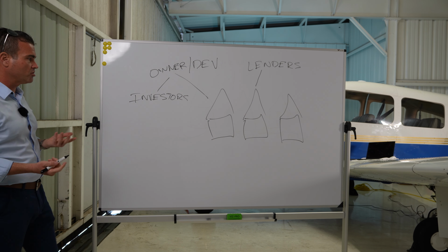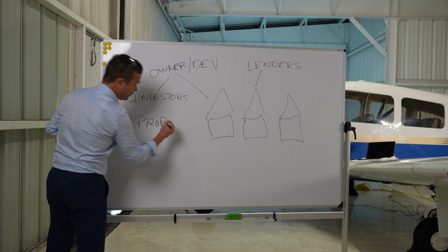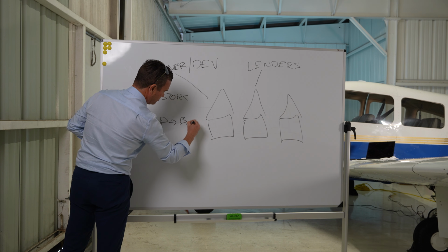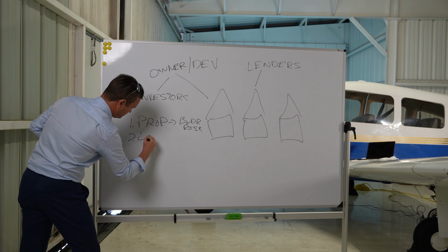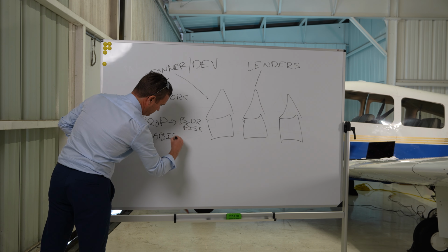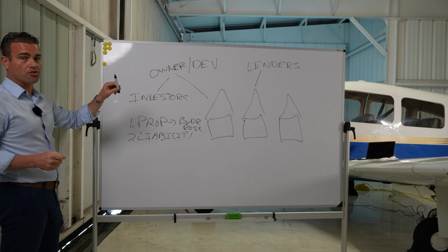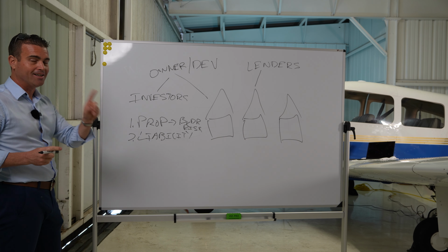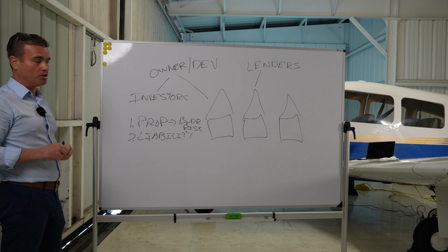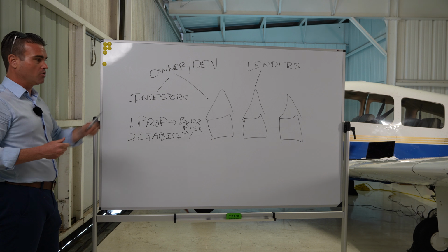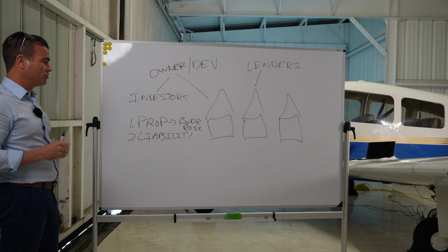So on a typical ground-up construction deal, what type of insurance coverage do we have? We have our property coverage. For construction, it's called builder's risk. We have our liability coverage. What do I mean by liability? Liability for the construction project to make sure that all the subcontractors have their proper insurance, depending on the insurance structure, or that the project itself, which is what we prefer to do, has the proper insurance should anything happen after the course of construction through the time of repose, statute of limitations, essentially, that you have proper coverage.